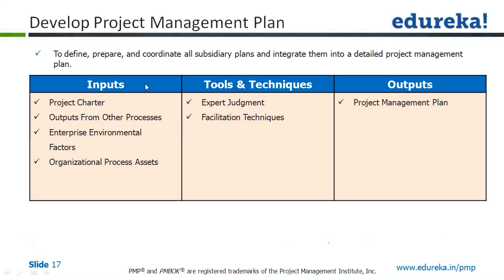So very clear, we are into the develop project management plan, which is part of the planning process group. We have taken the output from the previous process, which is the project charter, as an input. We have taken EEF, we have taken OPA, we have tools and techniques as expert judgment and facilitation technique, and the output is going to be the project management plan.